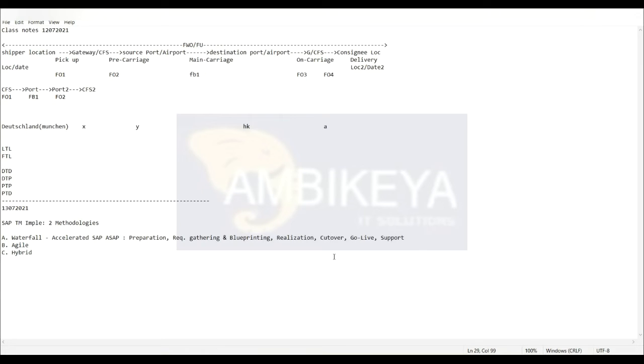And also there can be many other cases where, let's say, some number ranges are not actually transportable. So you locally create them in the production environment as a part of cutover activity. And all your transports also get ready to go into the production environment. So ultimately, when your cutover is over, you send all your transports to the production environment, and that is how your go live happens.